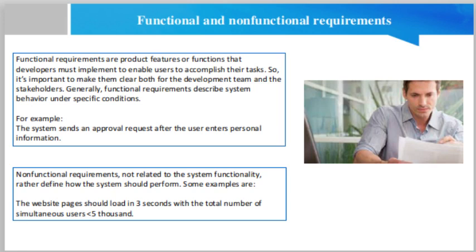The SRS can be a single document communicating functional requirements, or it may accompany other software documentation like user stories and use cases. We don't recommend composing an SRS for the entire solution before the development kickoff, but you should document the requirements for every single feature before actually building it. Once you receive the initial user feedback, you can update the document.